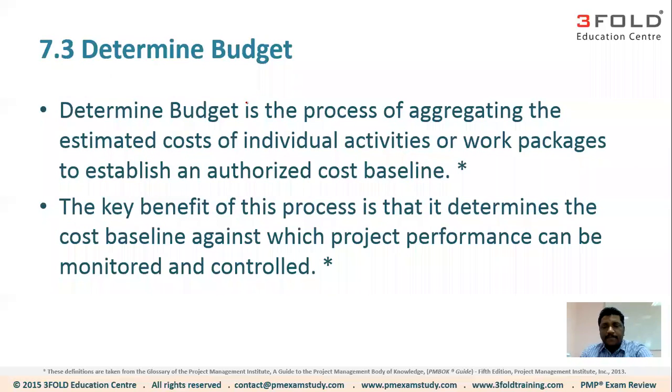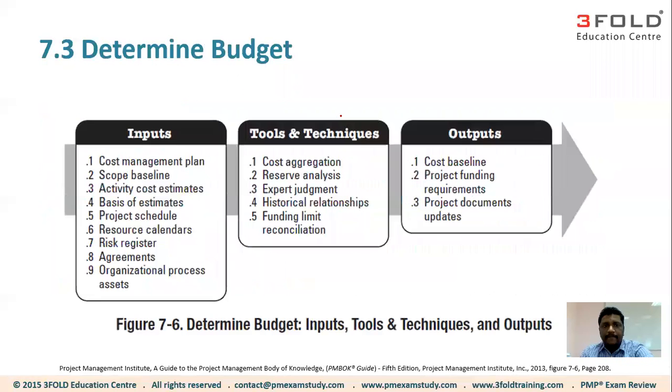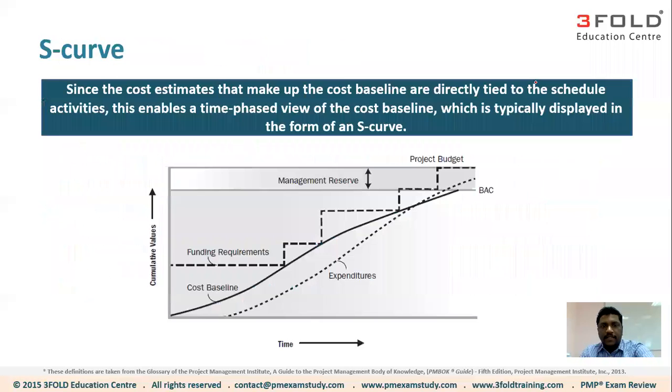The output of this process, determined budget. Okay. If you see here, interestingly, the output of determined budget is not budget. It is something called cost baseline. Okay. Now you need to understand what is cost baseline. Cost baseline will, I'll go back to that slide. Cost baseline will look something like this.